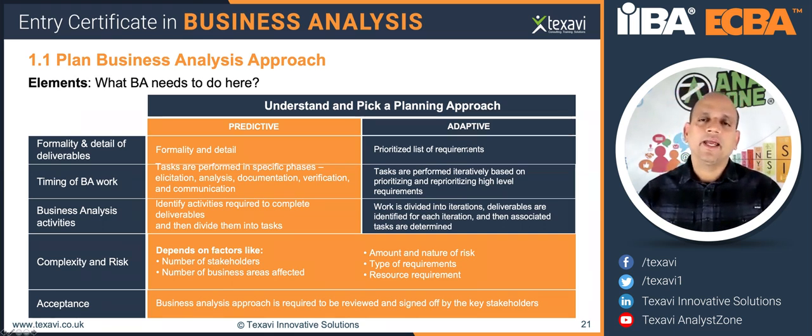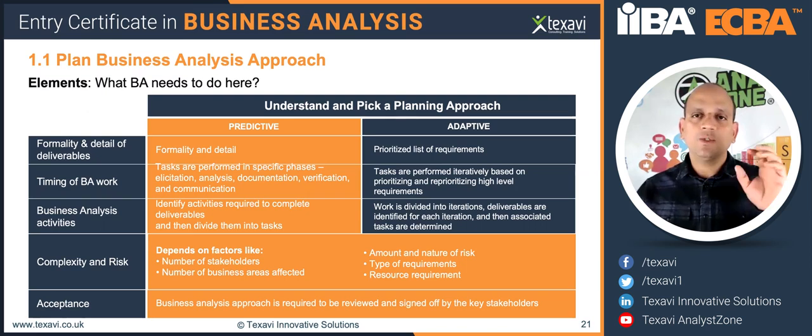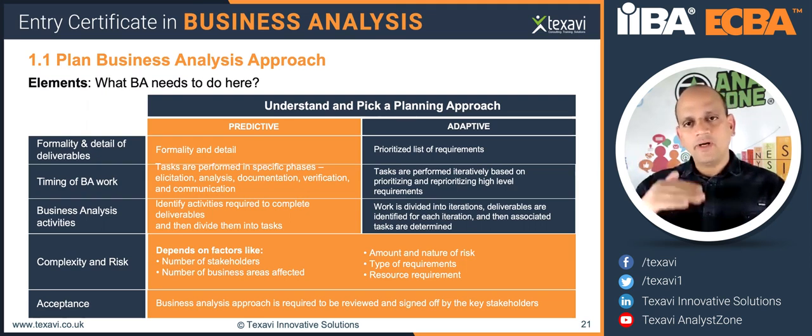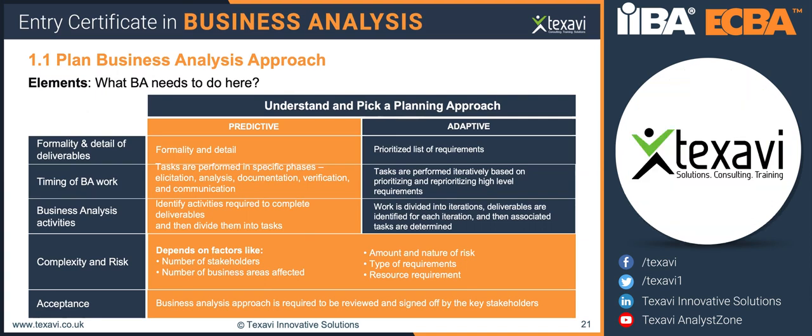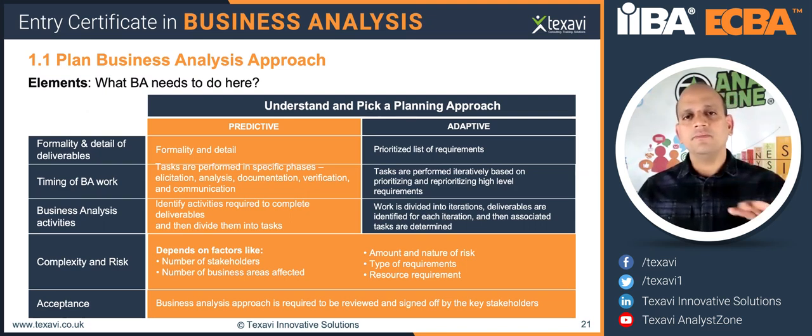So backlog gets prioritized. There's a product backlog which is maintained by the product owner that gets continuously updated with the requirements, with the tasks, features, defects, fixes, and change requests. All of that is just put into the backlog, and then they get prioritized depending on the importance and the urgency. We talked about prioritization aspects as well, right? We talked about the MoSCoW tool that can help you to prioritize those in terms of the must-haves, should-haves, could-haves, and will-not-haves this time.